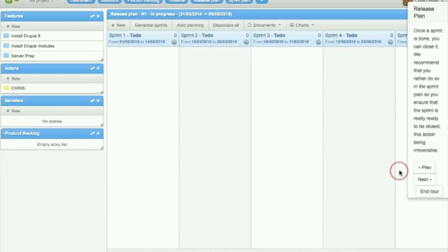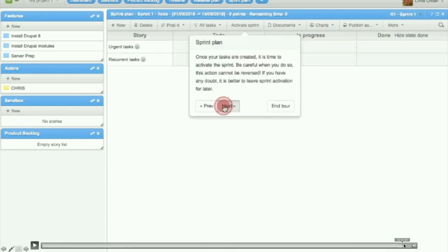AHA costs money. But it integrates with JIRA, it does automatic updates. So you can create stories in AHA and they import into JIRA, or if you update stories in JIRA they backport into AHA. But for planning, you make AHA your master and JIRA just for sprint level work. So, okay. Let's get through the end of this.